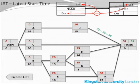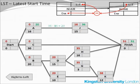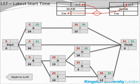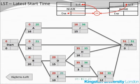51 minus 15 equals 36 — the latest start time for activity J. Then 36 minus the duration of activity A (16) equals 20, the LST for activity A. Similarly, 51 minus 30 (the duration of activity C) equals 21. 51 minus 16 equals 35 for activity H. 51 minus 12 equals 39 for activity K. 39 minus 3 equals 36 for activity G. And 39 minus 10 equals 29 — the latest start time for activity E.